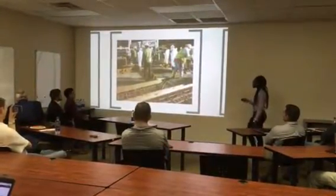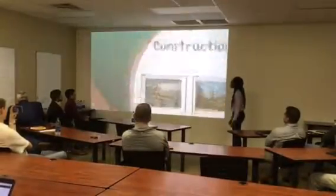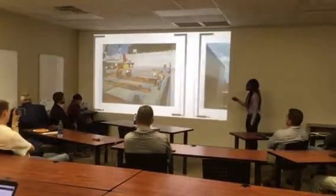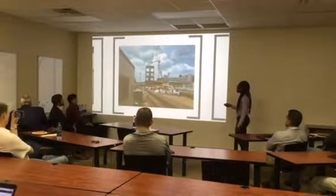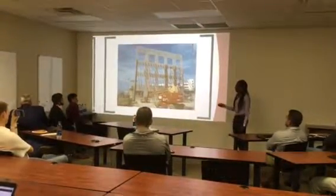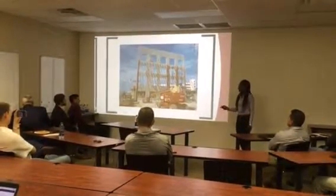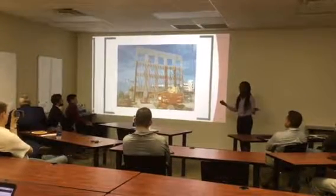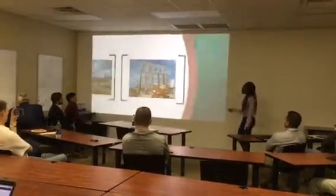For your concrete, it takes about 3 days for the concrete to cure, and then you put in your bracing, and then they'll lift it up. It really did scare me. But it all worked out. We pretty much have all of it in right now, and we're still working on installation. The braces get removed after the building diaphragm is set in place, so after the steel was put in place for us, then we removed the braces, and they're all gone right now.